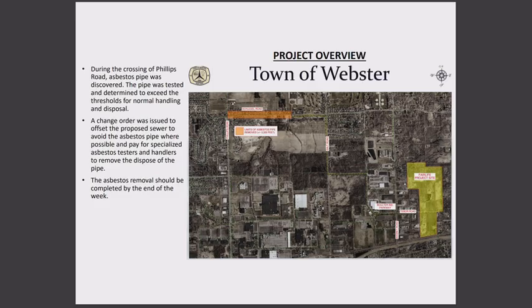Due to the depth of the sewer, it being about 20 feet deep, 24 feet deep, it would be an OSHA restriction to go down in it. So we didn't go down. In hindsight, maybe we should have gone down due to the age of the sewer and tested it beforehand, but I think this project was fast-tracked due to when it needed to be done. And it would have been something that would have needed to be handled regardless, because the first thing we did was look for alternate routes, just to avoid this altogether.